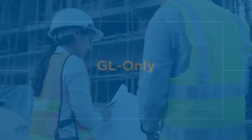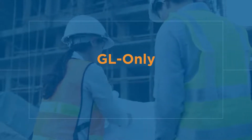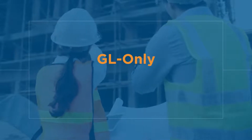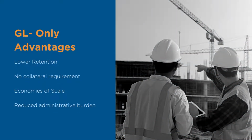Last but not least, we have general liability only, or GL only, CIPs. These have become very prevalent over the last decade. These CIPs are designed to provide GL and excess coverage only for the enrolled parties and do not include workers' comp. They can be placed by the project owner or the general contractor. For projects covered by a GL-only CIP, the workers' compensation coverage remains the individual responsibility of the contractors, including the subcontractors working on the project.